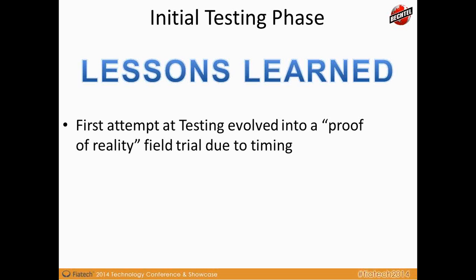So we learned an interesting lesson there: the initial deployment failed, and it failed primarily because we were defining a field process from the home office. There's a philosophy out there that it's okay to fail as long as you learn from the failure and you fail fast and fail forward, and I think that's exactly what we did.